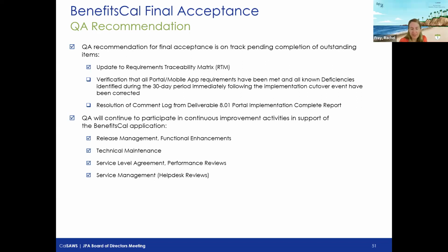So I know now, Diana, what you're referencing. There was a report that the community-based organizations used to get that they would then report to the federal government as to how their campaigns are progressing and that sort of thing. There is an enhancement request that we have that is allowing for outreach campaign referral codes to be tracked. So that is something that's coming up, but it was not part of the baseline scope for Benefits Cal. But it is something that there's a referral code that's going to be included going forward that they can then use. Okay, thank you.